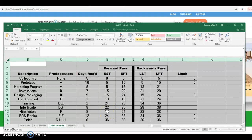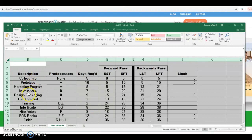Activity F has get approval as a predecessor, which finishes on day 16, so this starts on day 16 and finishes on day 24 because of the eight-day duration. For the racks activity, the predecessors are design packaging and get approval — the latest finish is day 24. So racks can start on day 24 and with a 12-day duration will finish on day 36. And then you have the finish node, which gives us a total project duration of 36 days.